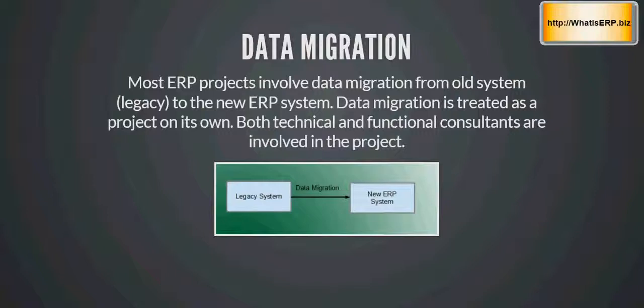Sometimes data migration is part of the project plan as well. If there is some legacy system before the implementation of a new ERP system, then the client may want to migrate part of the data or all the data from the legacy system into the ERP system. Then data migration becomes a mini project. It is sometimes very complex to deal with. Both functional consultants and technical consultants have to take a role in this mini project. Sometimes it's a mega project, sometimes it's a project on its own, sometimes data migration is part of the ERP implementation project. But not all the time does data have to be migrated.